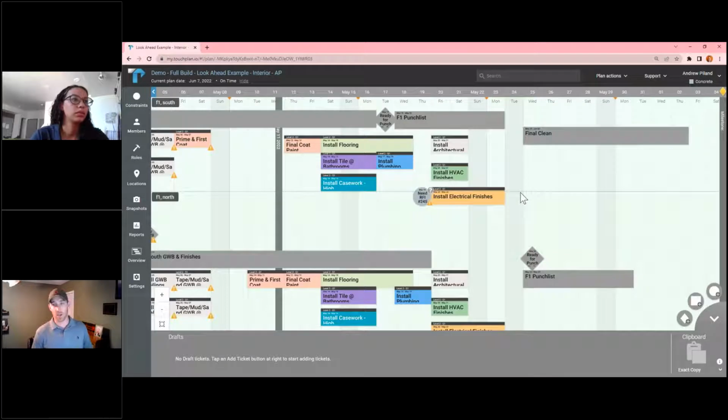I'll actually create that constraint. She can see it in her workflow and visually understand what exactly in the plan is going to be affected by it. And she might come back to me and say, yeah, that's not actually a priority, I'll get to that at this point. And then for me, I'm saying, okay, cool. Look, we've had this conversation. It's there, it's captured, it's tracked, away we go.